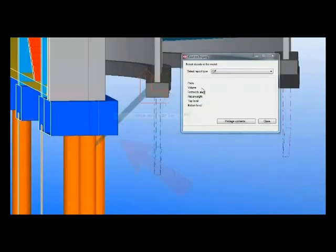And of course, the other incredibly handy thing is once you start modeling things in 3D, you begin to see things that aren't quite so obvious when you're looking at something like a 1 to 100 plan from your engineer on a drawing. In this particular instance, it seems the engineer may have omitted, hadn't realized, if you like, that the bearing capacity of the base of that ramp was going to interfere, or collide, if you like, with the pile caps on that structure next to it.